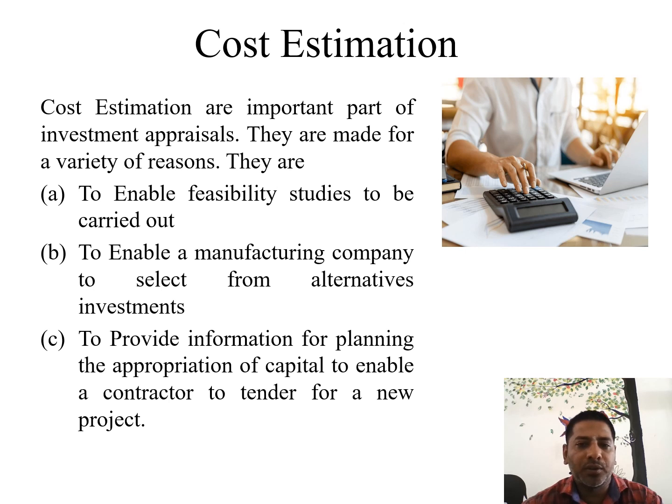Cost estimations are important parts of investment appraisals. They are made for a variety of reasons: first, to enable feasibility studies to be carried out, to enable a manufacturing company to select from alternative investments, to provide information for planning the appropriations of capital, and to enable a contractor to tender for a new project.